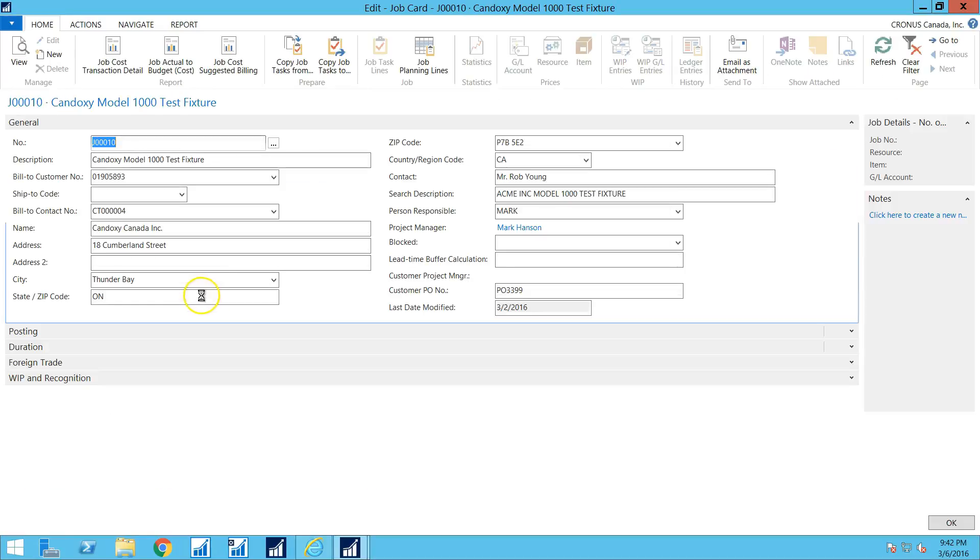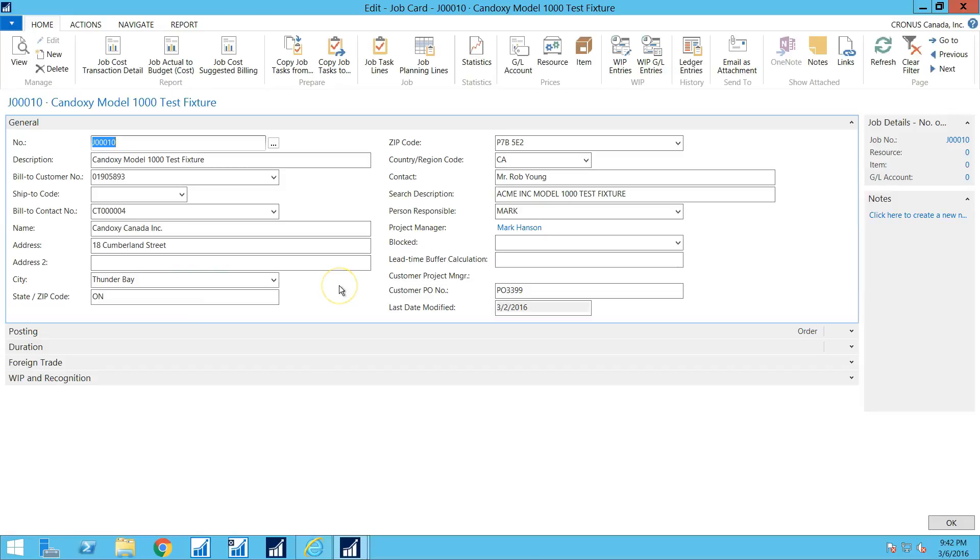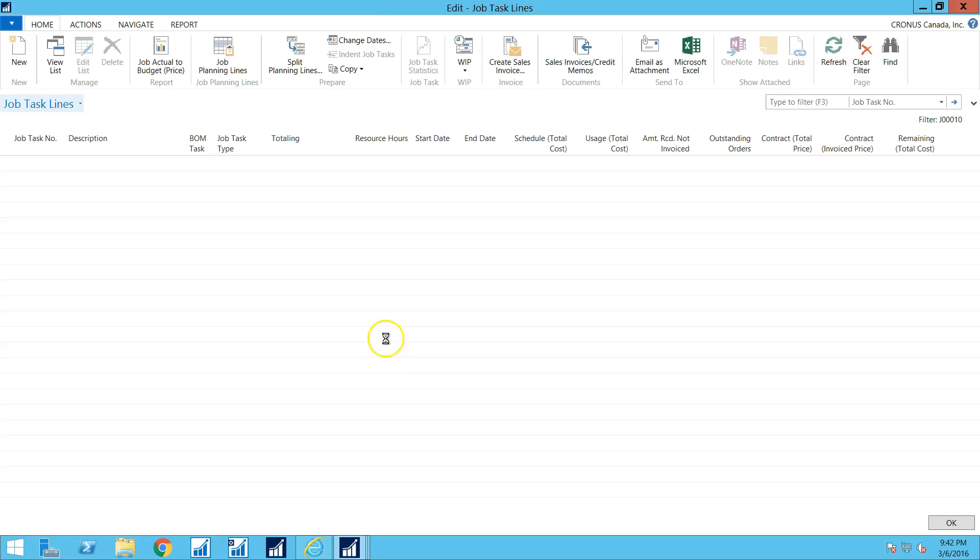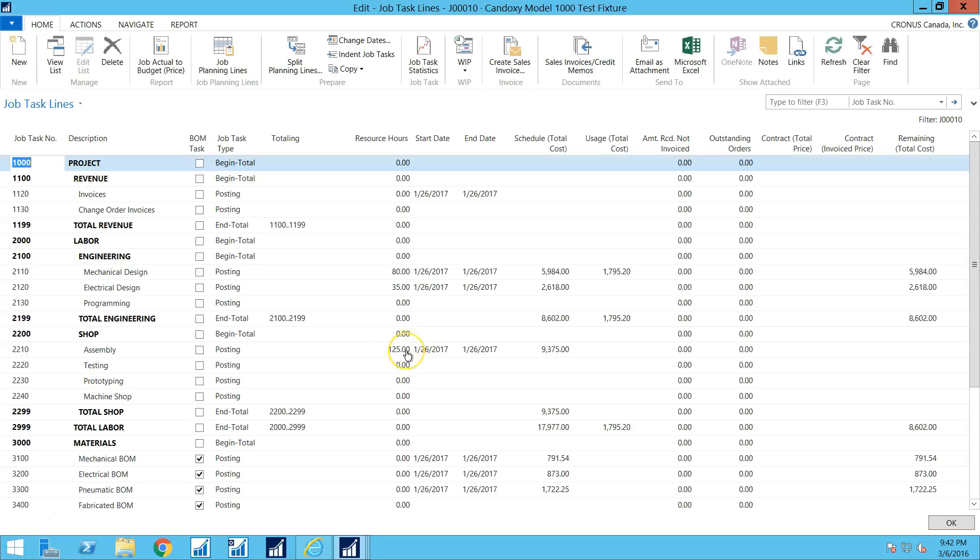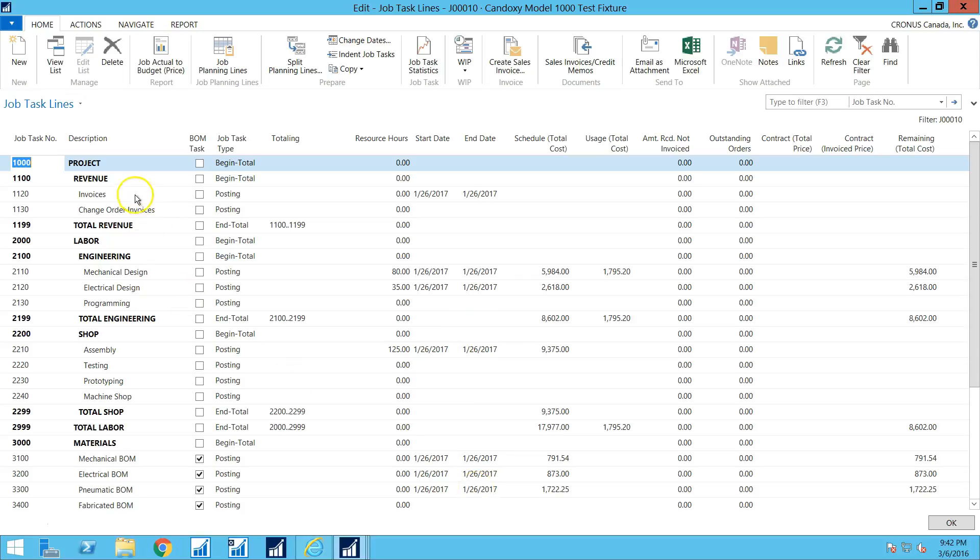So let's take a look at Condoxy and I'm going to first bring up a job. So this is an existing job where I've put some time and materials against the job. As you can see, I've broken the job down into different kinds of cost categories. So along the side here, I have engineering labor, shop labor...